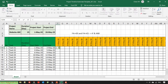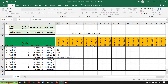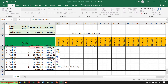I will write: equals IF AND — I'll use the formula bar at the top for easier checking. I have: AND( F4 is greater than or equal to D5, F4 is less than or equal to E5 ), close the AND, then I will put 'H' as the true value — otherwise it will be blank.